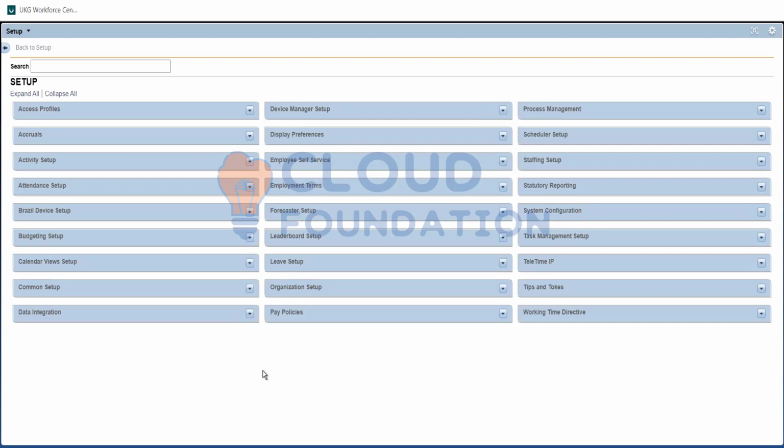Again, in the agile model, it's the same. We promise we will work these number of points for a particular sprint. It is the work of a scrum master or someone from the client side to create that many user stories and give you that many points for the start of the sprint. If 100 points are promised for a sprint and they are not able to bring 100 points of user stories, whatever they bring, we are going to work on it. That's it.